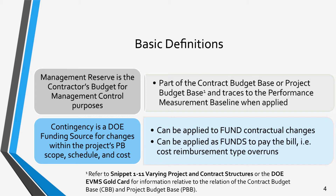Refer to Snippet 1-11, entitled Varying Project and Contract Structures, or the DOE EVMS Gold Card for information relative to the relation of the Contract Budget Base, CBB, and the Project Budget Base. Contingency is the DOE's funding source for unforeseeable costs within a project. It may be applied to fund contractual changes within the project's performance baseline scope, schedule, and cost.